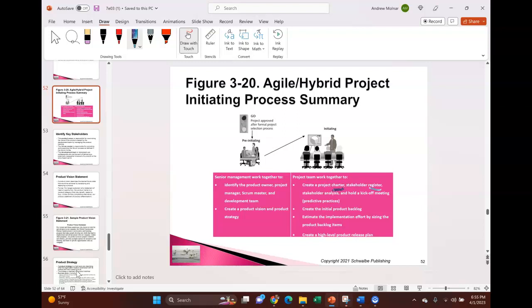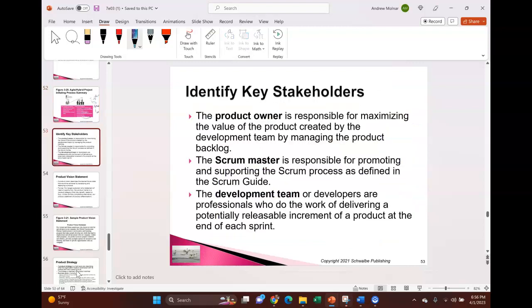But what you're going to do instead of requirements, you create a product backlog. That's a list of things you want to develop that you think have value. Okay, and you're going to prioritize those and pull them forward into a sprint. Okay. And you might pull 2 into a sprint that you can do in 2 weeks, complete the 2-week sprint, and produce that thing of value that I was talking about. Okay. And when you have a couple of sprints done, you'll do a product release and demonstrate it to stakeholders, right? Show it off. Okay.